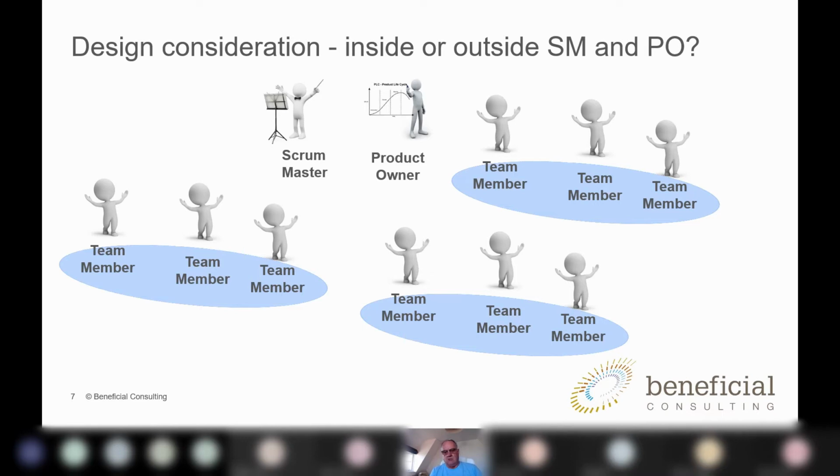So the Scrum Master in those instances will be saying to the product owner, look, the size of your work items is too big, it's causing the team to slow down. We should therefore think about how we can break this work up in a different way, and so on.